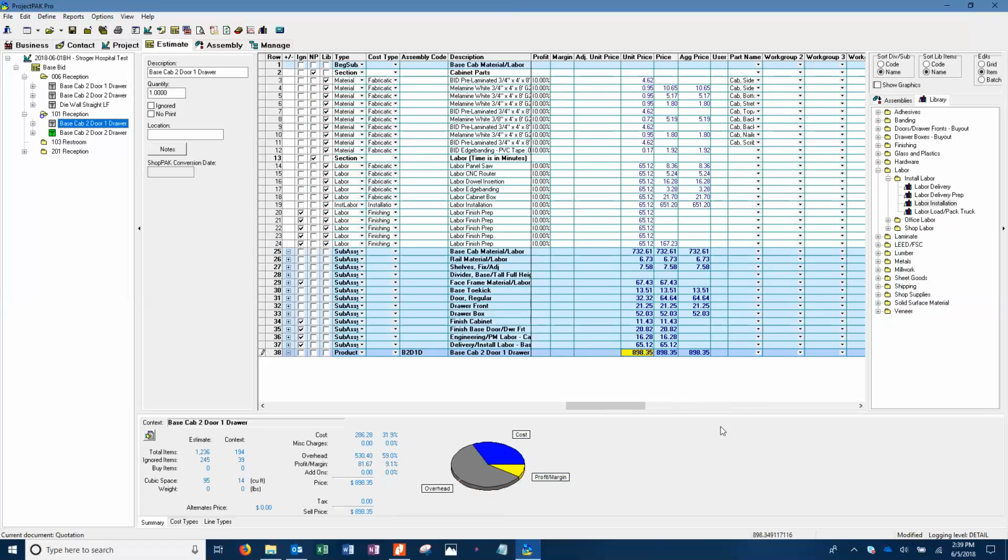So it's a great tool to round up, to make things look better, to say, hey, I know I can get more money for this. The reason it was actually invented is for the horrifying reason that you go in for a scope review and you realize you forgot something. And now you need to honor the price. You're stuck. So you're going to go ahead and put in what you said it was going to be, and then you're going to drag all the crap you forgot in.